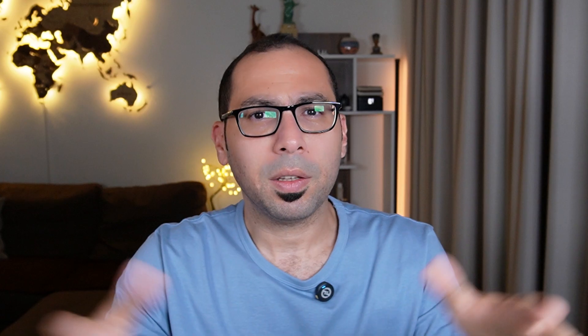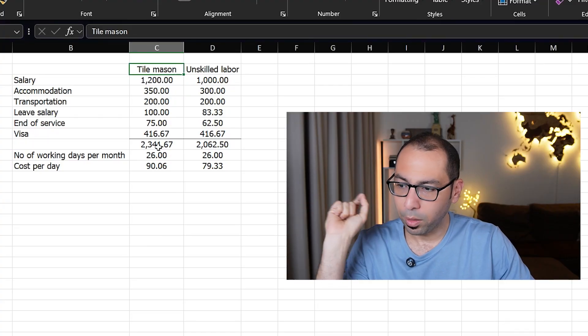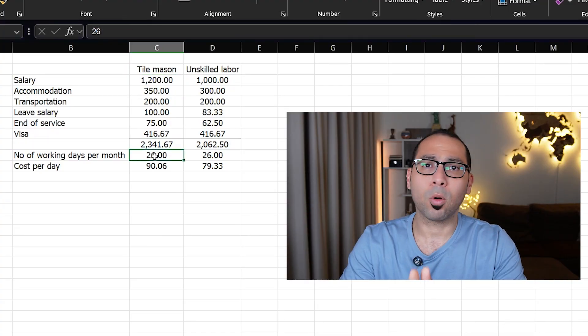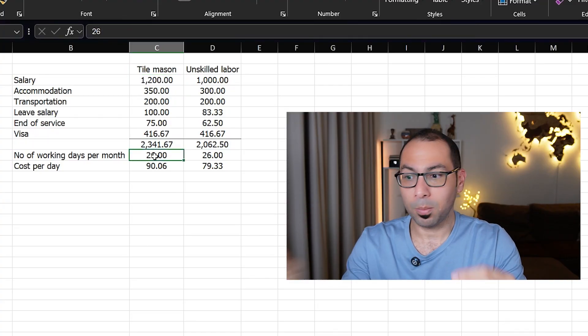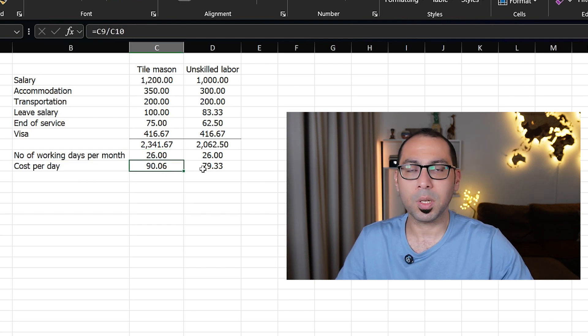This concept applies to any skilled labor — plumber, electrician, block mason, tile mason, carpenter, steel fixer — it doesn't matter. The concept is the same: how much is the cost per month, and what is the number of working days per month. When you divide both you get the cost per day.